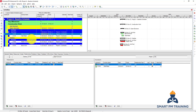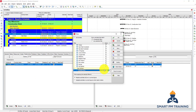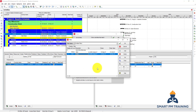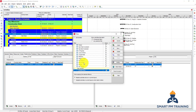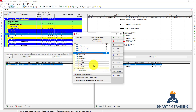So these are the filters — you can have as many as you need. You can use the default ones or create custom ones, but be careful about choosing whether you want all conditions met or just any one condition. In the next section we will talk about resources.